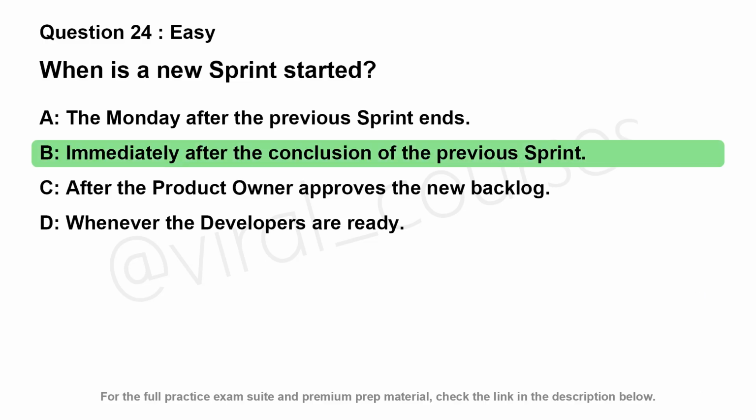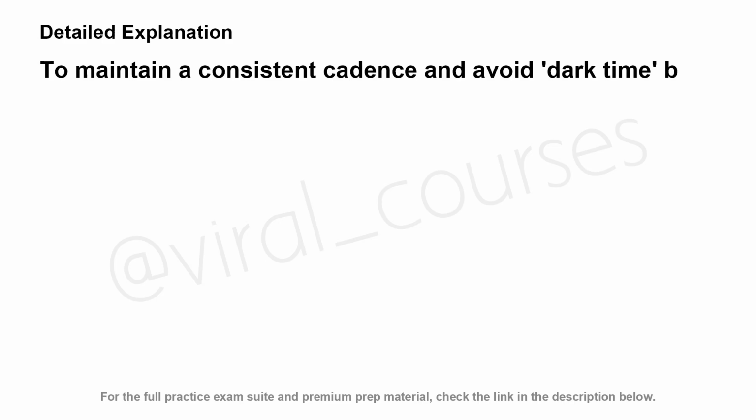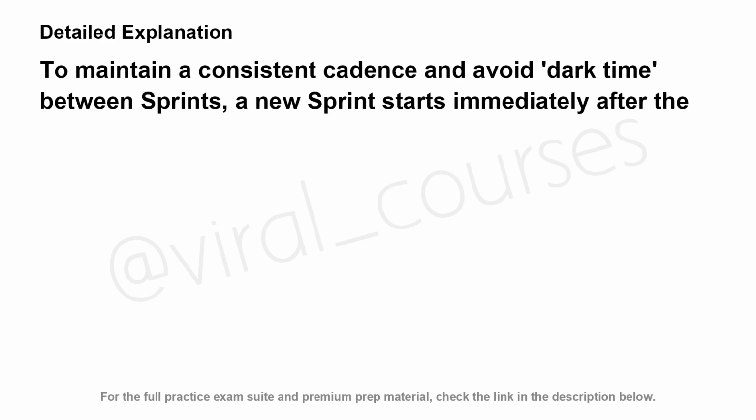The correct answer is B. To maintain a consistent cadence and avoid dark time between sprints. A new sprint starts immediately after the conclusion of the previous sprint.